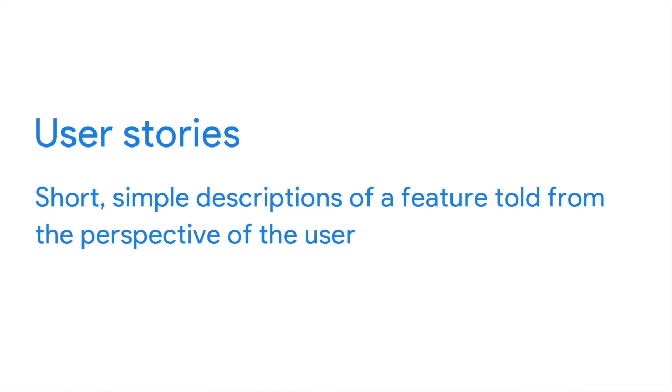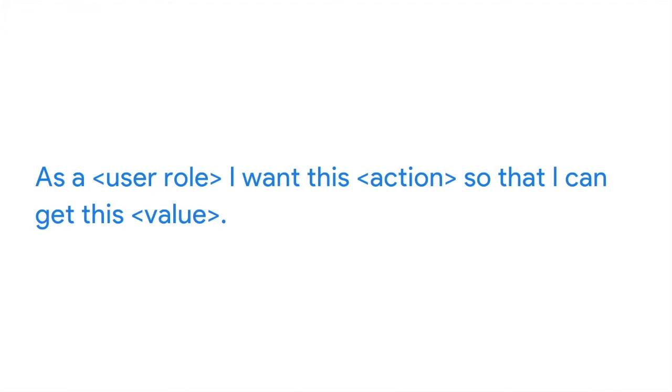Now you know more about defining the product backlog, who owns it, how various roles work with it, and how to identify each field. Let's discuss a popular way to capture and manage backlog items: user stories. User stories are short, simple descriptions of a feature told from the perspective of the user. This helps the team create a solution always centered around the user and the user experience. User stories are made up of three elements: the user, the action they will take, and the benefit to them. The most common format is: 'As a [user role], I want [this action] so that I can get [this value].'